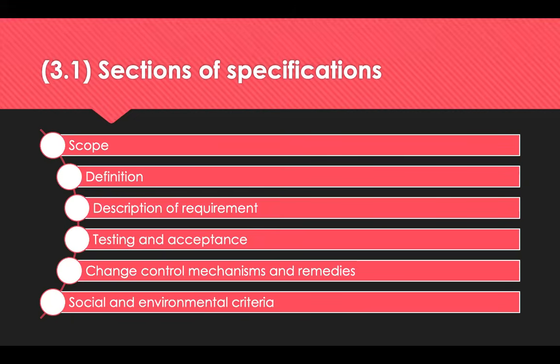It makes sure that the functions and attributes, constraints, preferences and expectations of a product are fully explored, and any trade-offs between them are agreed. There should be sufficient information in the specification to allow the contractor to quickly and accurately develop a price for the product or service and to minimise risk later in the life of the contract.